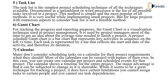Calendar: many don't consider scheduling tasks on a calendar for their project requirements when they should. Most calendars can be curated with names of their own. You can create one calendar per project and schedule events for that project. The calendar shows a timeline for the entire project. The major advantage is that it can be subjected to changes as it is shared. While it seems to be a great technique for tracking a project, it does have certain limitations — you cannot assign tasks to certain people and you cannot see the task dependencies. For example, giving an entire calendar of a course of study for a particular subject is an example of this.